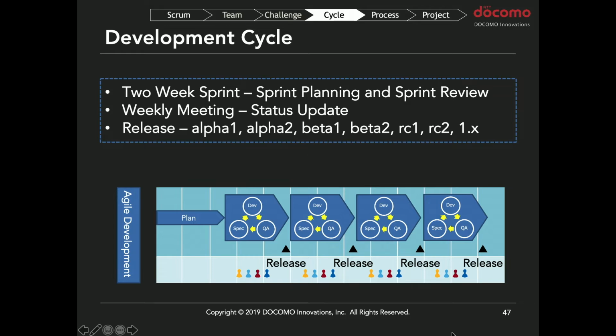And then for release, internally, we start from the Alpha 1 version and Alpha 2, Beta 1, 2, RC1, 2, and a release. This connects to semantic versioning, basically. We put Alpha 1, 2, Beta 1, 2, RC1, 2, and a release. It means each release is for 2 weeks. It means finally, after 4 or 6 weeks, we have a major release version, and a minor release version.